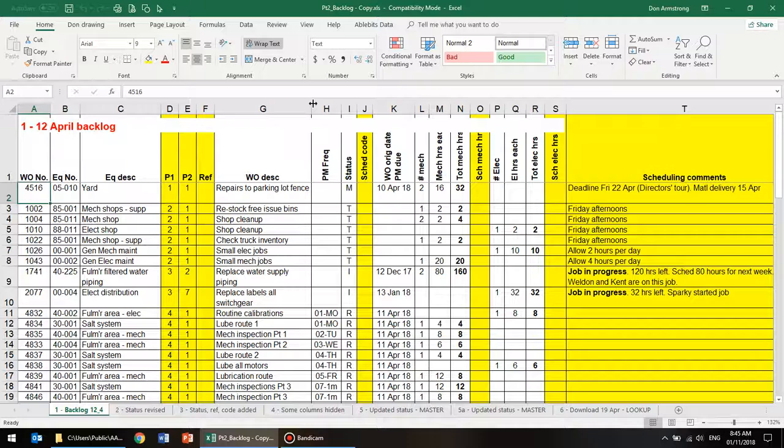Now, remember that priority or urgency, same thing, is based on the risk of something happening in a certain time period. It's affected by things like changing equipment conditions, getting noisier. It's affected by things like opportunities. If you have an outdoor painting program, then you have to finish it before the end of the summer.